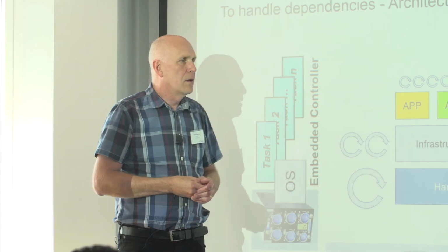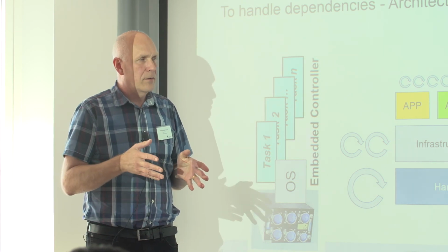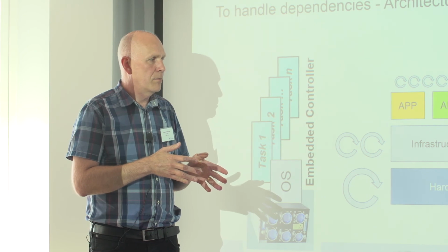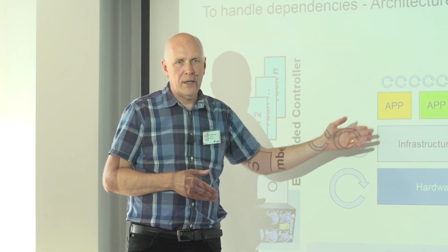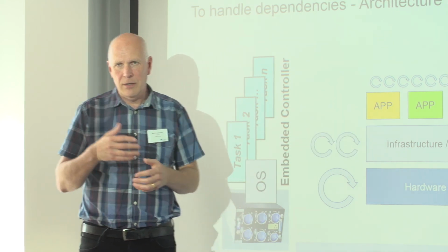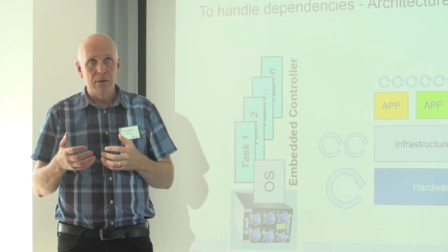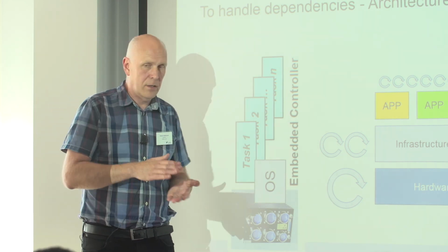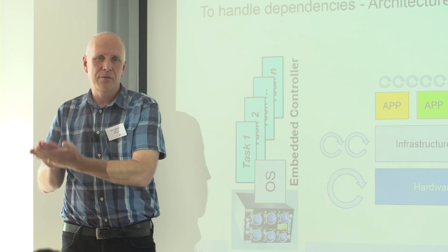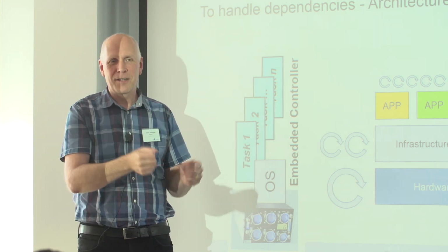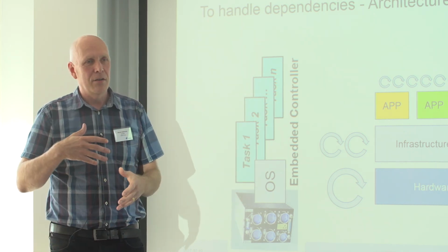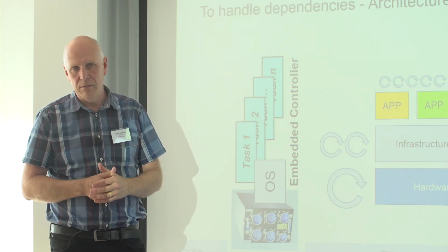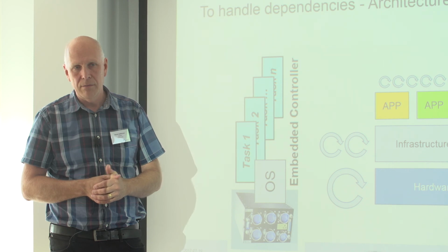That's different in different businesses, because some suppliers have more of an agile approach, so we easily discuss the requirements and can change them more easily. But others have more of a contract. We sign the contract, it runs 4 years, and then we get the things. So there are different approaches for different businesses, different contracts.